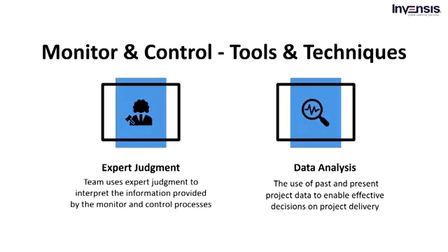Finally, we have a variance analysis. It reviews the differences between planned and actual performance. This includes time period estimates, cost estimates, resource utilization, resource rates, technical performance, and other metrics. Variance analysis can be performed in any area of knowledge based on specific variables. Variance analysis checks for deviations from an integrated perspective when monitoring and controlling project work, taking into account cost, time, technology, and resource deviations to get a complete overview of project deviations. This will allow you to initiate appropriate preventative or corrective action.